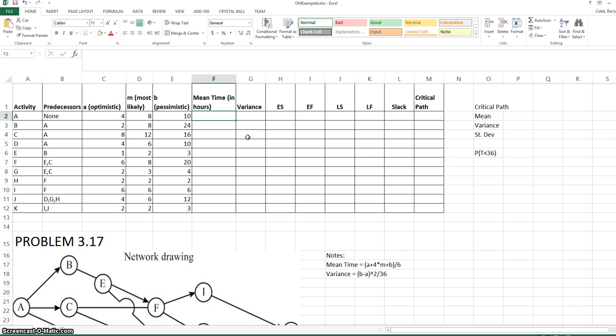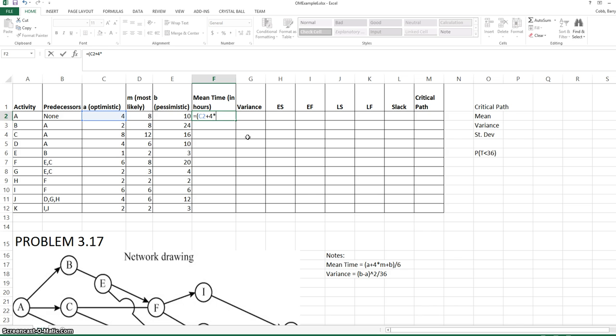For the beta distribution, the mean will be the smallest possible time, or optimistic, plus four times the most likely, plus the pessimistic, divided by six. This formula holds for any beta distribution.